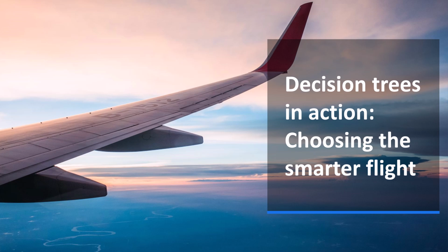Ouch. Okay, so what are the specifics for Flight A? Right, Flight A costs €900 upfront, and there's a 10% probability of hitting that €4,000 delay cost. So the expected cost from the delay alone for Flight A is 10% of 4,000, which is 400. To get the total expected cost for Flight A, we add that 400 risk cost to the 900 ticket price. So 900 plus 400, that's 1,300. Exactly. That's the expected monetary value, the EMV for Flight A. It's basically the ticket price plus the weighted risk cost. 1,300 total expected cost. Got it.